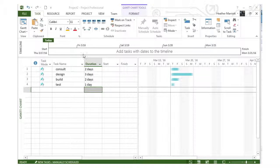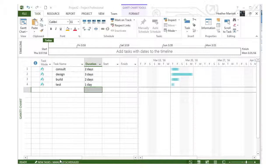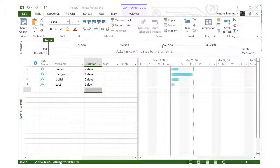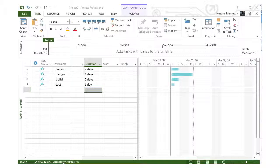Hi, I just want to talk about the difference between manually scheduled and auto-scheduled tasks. The green bar at the bottom of Microsoft Project shows that the default is manually scheduling for all tasks. That means you assign a certain start date and Microsoft Project won't change it.